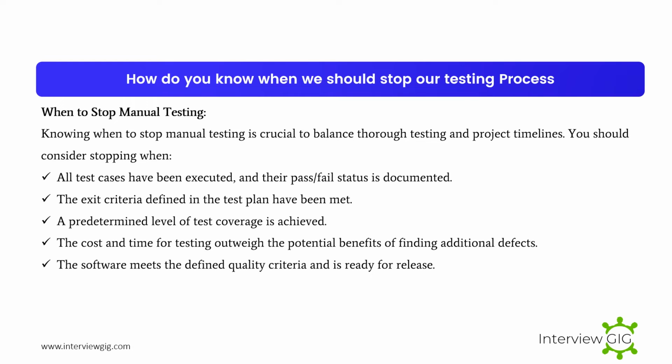All test cases have been executed, and their pass-fail status is documented. The exit criteria defined in the test plan have been met. A predetermined level of test coverage is achieved. The cost and time for testing outweigh the potential benefits of finding additional defects. The software meets the defined quality criteria and is ready for release.